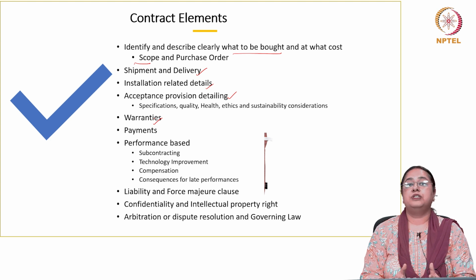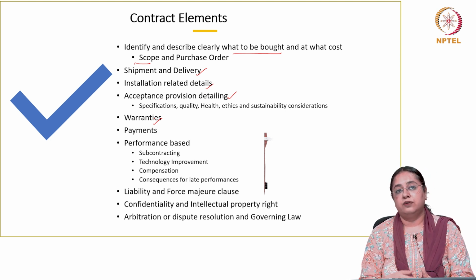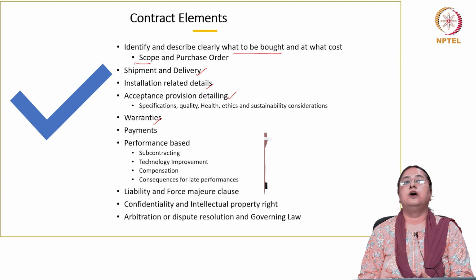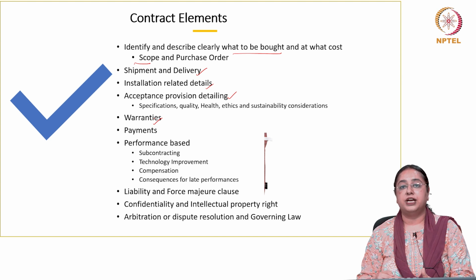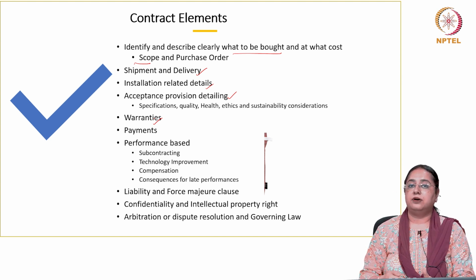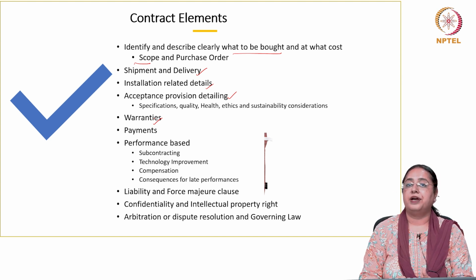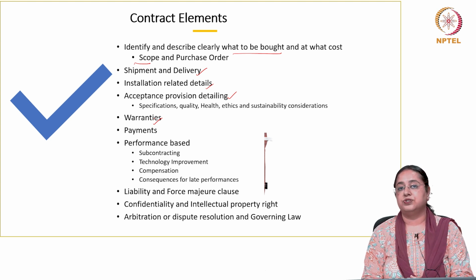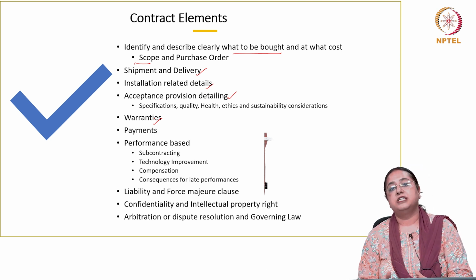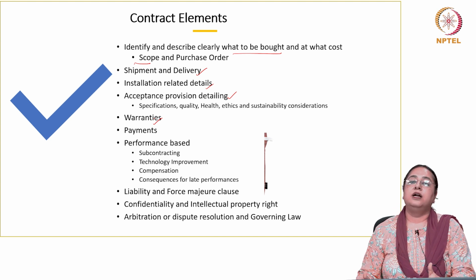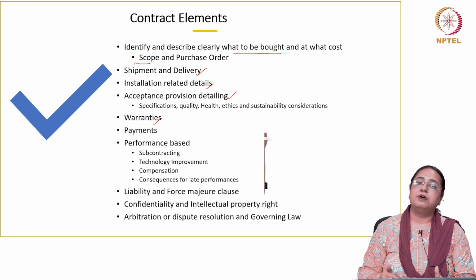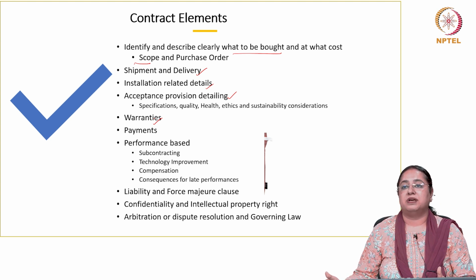Is there any provision for having some kind of contracts here, contracts for the payment schedules and maybe the payment amounts, right? Everything has to be clearly mentioned. For example, payments would be done within 10 to 20 days of the date of delivery. This is a very, very important statement to be mentioned, right?